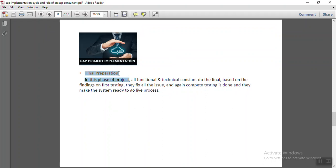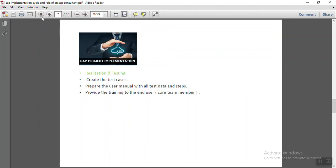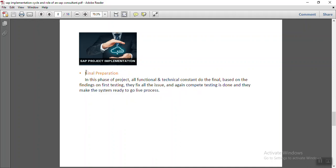Then comes the final preparation phase. If any errors are found during testing by the core team members or functional consultants, those errors are fixed in this phase. All objects are made ready for the go-live process, and after doing the required small modifications, a complete final cycle of testing is done to make the system ready for go-live.